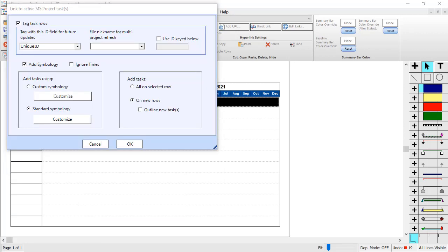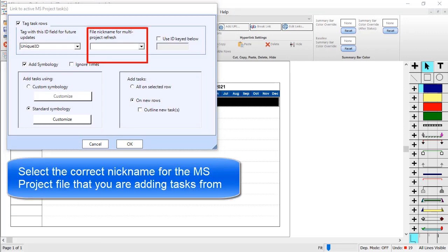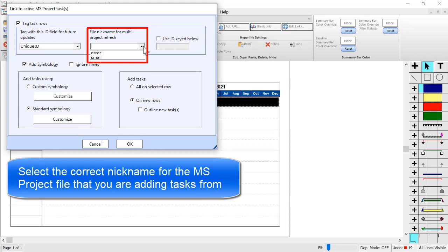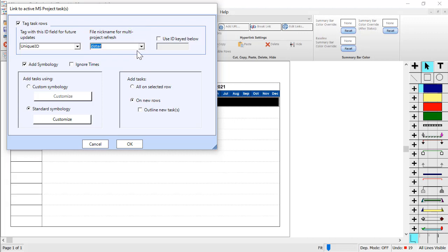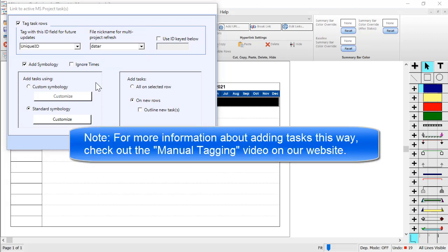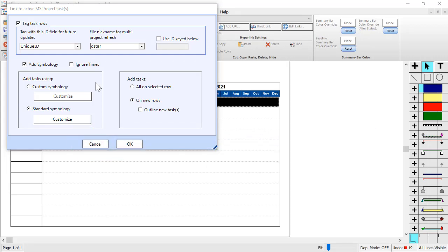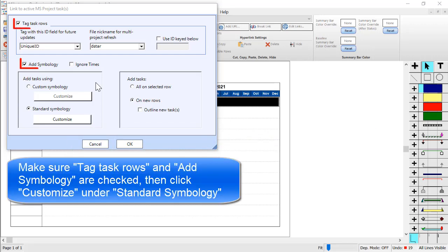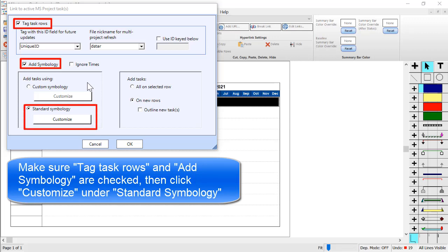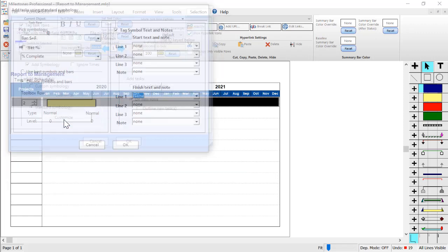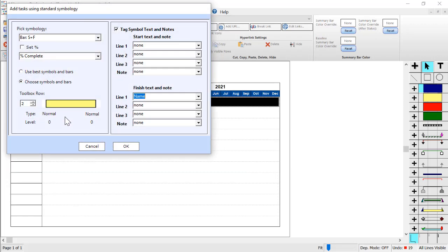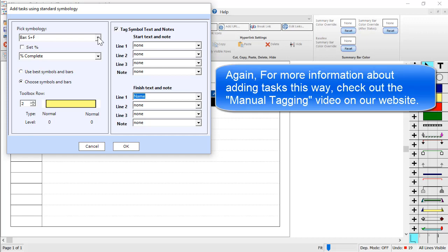Inside of this dialog box you want to make sure you choose the nickname that these tasks will use. If you click this drop-down you can see the list of available nicknames from your refresh file list. I will choose the D star nickname since we're getting tasks from that death star file. Just a quick note about this process: if you'd like more information we have another video on our website about manual tagging. For this example I will make sure Tag Task Rows is checked as well as Add Symbology.